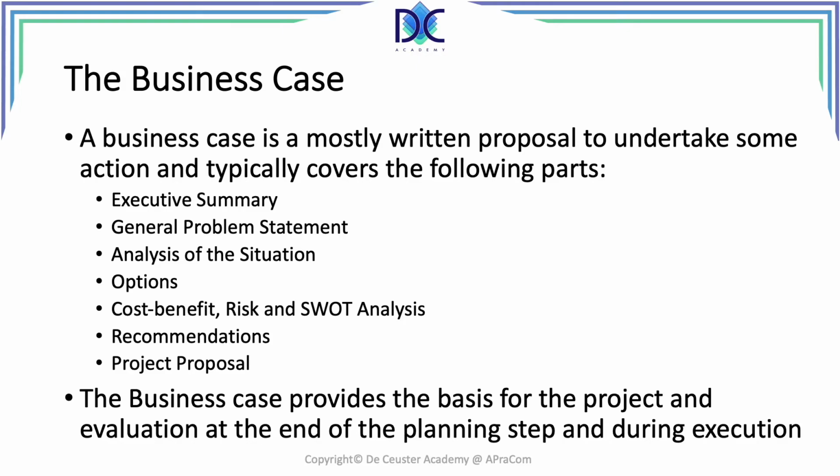A business case provides the basis for the project and evaluation at the end of the planning step and during execution. The project that is supporting the business case has to be beneficial to the organization. It means that it should be financially attractive, hence realizing a profit or attaining a specific yield. During planning, the team will evaluate if the estimations in the original business case are still valid, and during execution, the project manager will verify how progress, timing, and cost comply with the conditions of the business case.